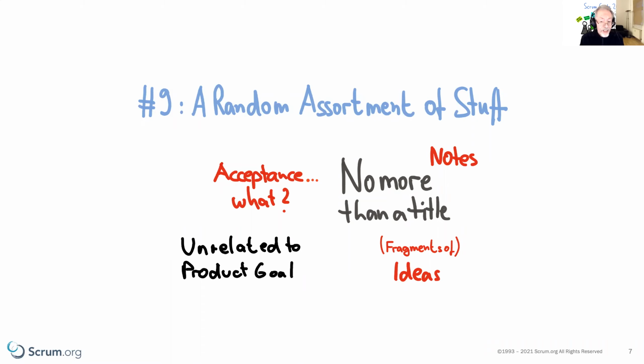So my suggestion is, if you'd like to avoid this, watch out for stuff, remove stuff, and create different areas for stuff. So for example, if you have an idea pool that is feeding into experiments, which might be feeding into the product backlog once they're validated, put it somewhere else, but don't use the product backlog for that purpose.